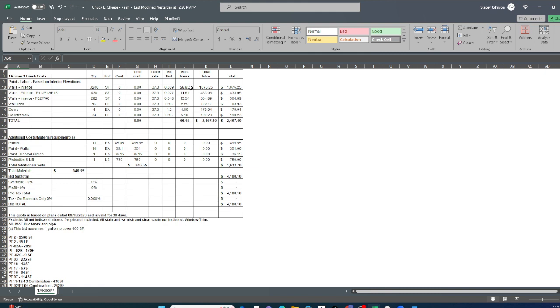So we get that from our cost book. That's how you know accurately based on construction industry standards, how long it's going to take you to do a job, then you can determine how many people you need. The construction schedule should tell you how many days they expect you to take to do the work. And then you can decide how many people you need to do the work in that amount of days.